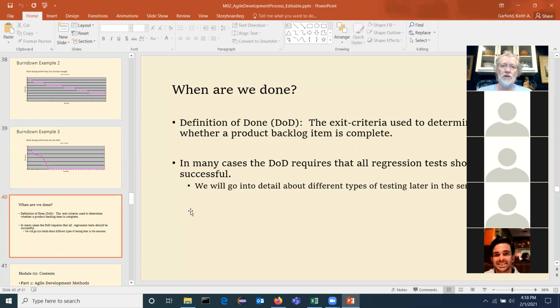at the end of your sprint, you would like to say, I got my user story done, it's done. Well, that's where this definition of done comes in. I think it's a critical thing that's easy to overlook. But basically, when you say you're done with a user story, what that should mean is you never have to touch it again. And that means that everybody has to agree, yeah, it really did do what we thought it was going to do.